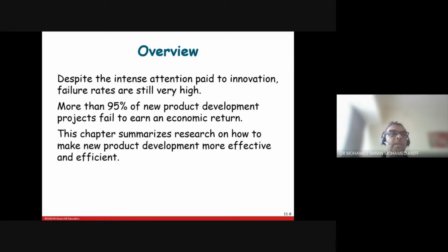So first you want to test this e-wallet implementation in Ipoh. So stage one is Ipoh. So you implement. Let's say there are some problems, then you have a gate there to tell you that we cannot implement e-wallet processing to other branches because we have problems.